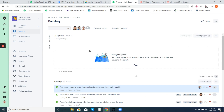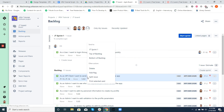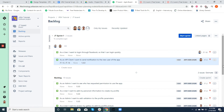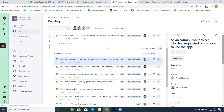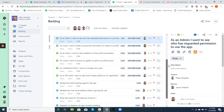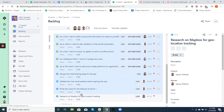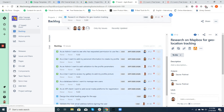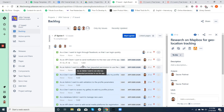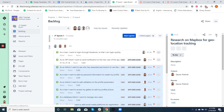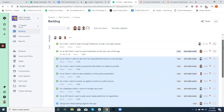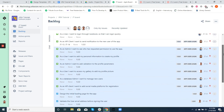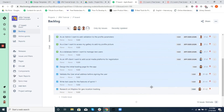Now you might be thinking how to move user stories or tickets to a sprint. You simply drag and drop the ticket, or you can click on the ticket and select the sprint where you want to send the ticket to. To bulk move the tickets, click on the first ticket of the list, hold the Shift button, click the last ticket of the list, and then drag them all to the sprint. Sprints are time-boxed iterations where we forecast and commit for certain deliverables. We should only take as many tickets as the team can complete within that time frame, which is usually one to four weeks.